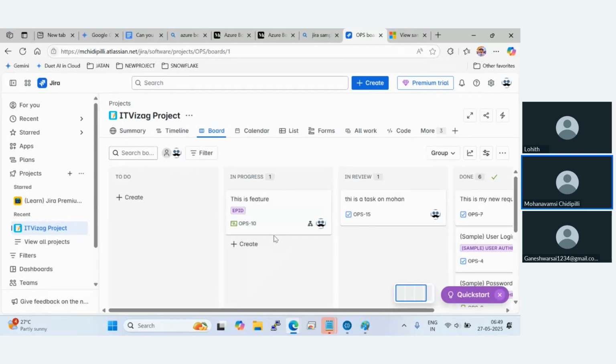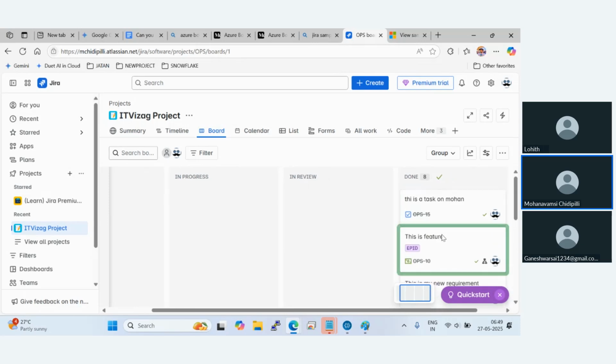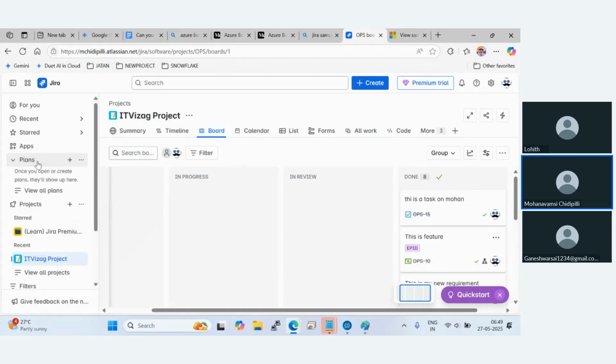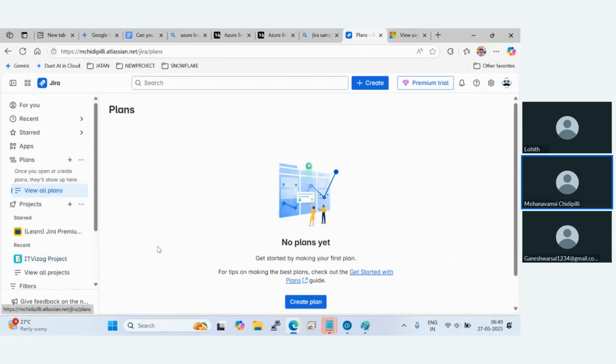I explain what this particular feature is all about. The Scrum Master will be the lead for that call and will take complete control of it, asking different questions based on the situation. He will also track how many hours each person works in a week or month, and everything is handled by the Scrum Master. The employee just completes his task, updates the hours and moves it to the completed state. Once everything is completed, they will pull up a report of what has been completed, and based on that they will plan the next sprint.